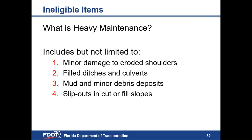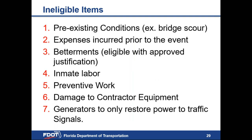Lena clarified regarding inmate labor on slide 29: not only is inmate labor itself not eligible for funds, but if by any chance a project used inmate labor, the entire project will be ineligible. Mahmoud added that in addition to inmate labor, any materials created by inmate labor are also not eligible. For example, Florida uses some type of pavement marking produced using convict labor — if you use that material, the entire project will be ineligible. Convict-produced material is not eligible.